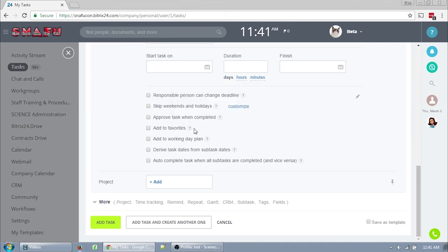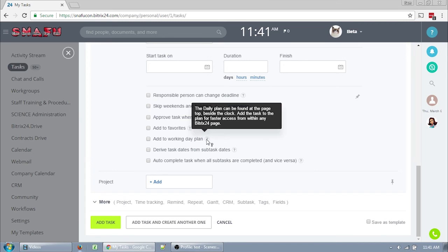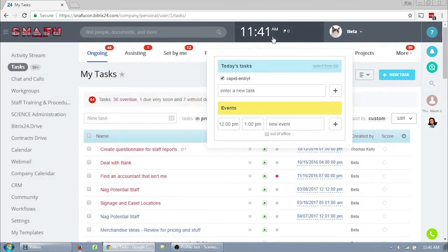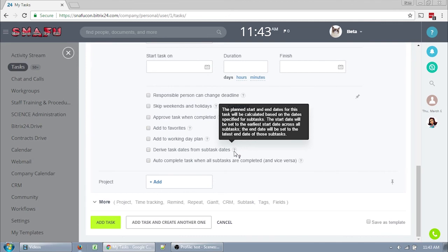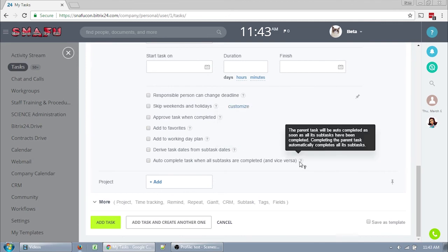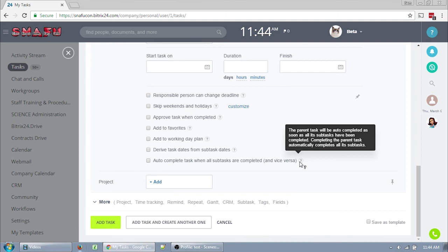Add to working day plan allows you to add this task to your current I am planning on doing these tasks today list. That task is up here under the clock and it allows you to access specific tasks more easily no matter where you are in Bitrix. Derive task dates from subtask dates is a brand new field to me that I have not played with. This looks like a really useful option so that you don't have to set your start and end dates, it just calculates them based on whatever subtasks you have. So if this is a base task and it has a bunch of subtemplates, this will set the start and end for you on the Gantt chart. Autocomplete tasks when all subtasks are completed is another brand new field for me, but it looks like if you have a bunch of subtasks and you complete them all, it will automatically mark the parent task as complete and if you mark that parent task as complete, it will automatically complete all of the subtasks. So that could be a time saver.